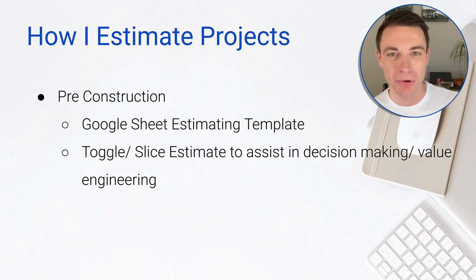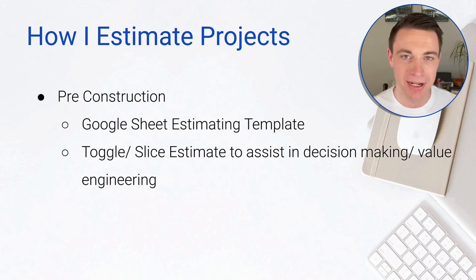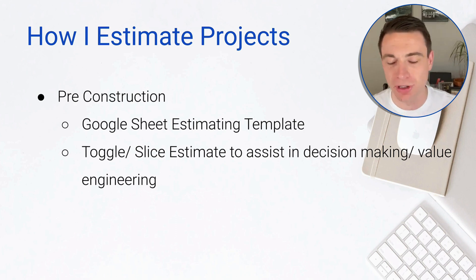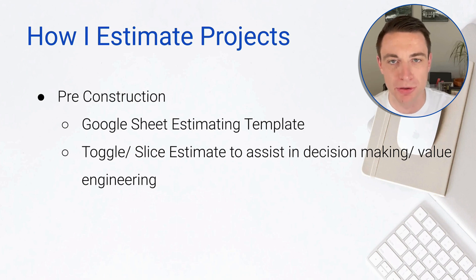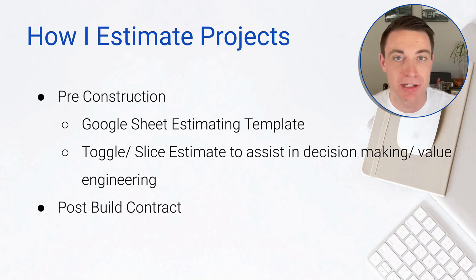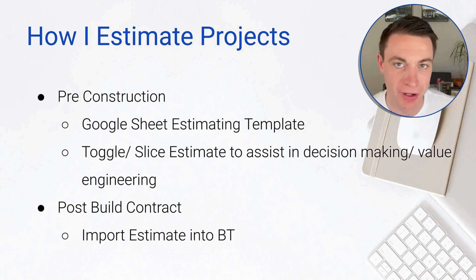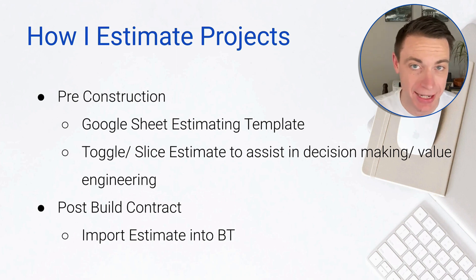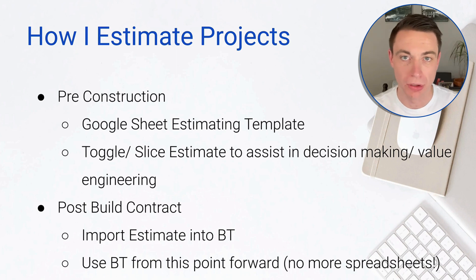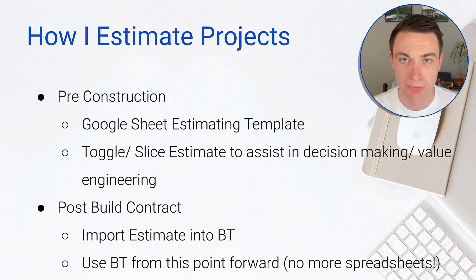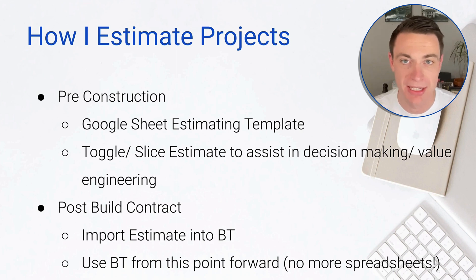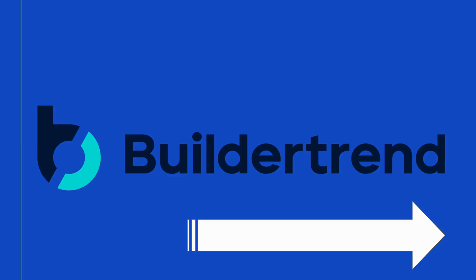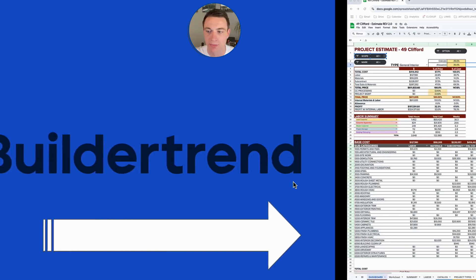BuilderTrend estimates is really good, but I need a little bit more flexibility during pre-construction. I'm detail-oriented and like to move things and shift things around and present it in a certain way. I don't use BuilderTrend estimates until I get to a build contract. Once we have that build contract, we import into BuilderTrend and manage within BuilderTrend from here on out. We no longer need to slice and dice the data. From this point forward, it's an amazing place for selections, change orders, bids, everything - no longer needing the spreadsheet. Let me show you my system and how this works in practice.